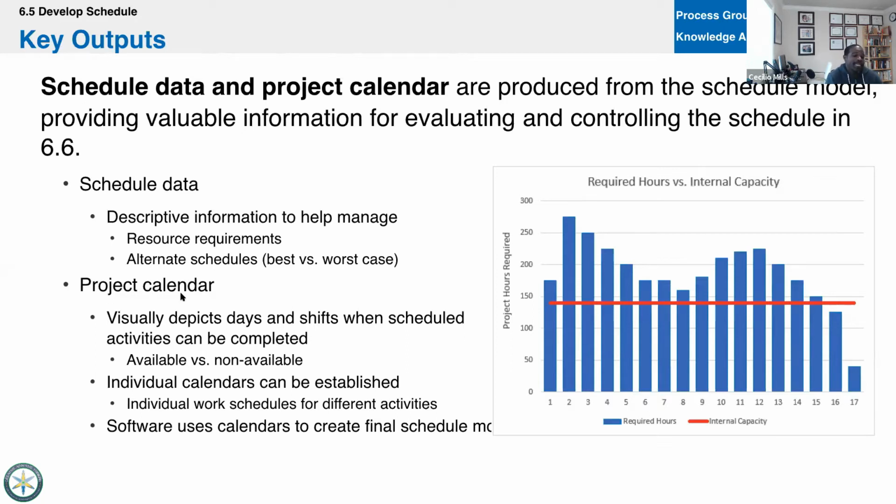And then the project calendar. The project calendar is just the days that work is happening on the project. And so work could be happening on the project 365 days of the year, including federal holidays. However, there's a resource calendar where there's certain folks who are only available on these days and machines that are only available so many hours at a time, et cetera, et cetera. So the project calendar shows when work is happening on the project, regardless of resource.